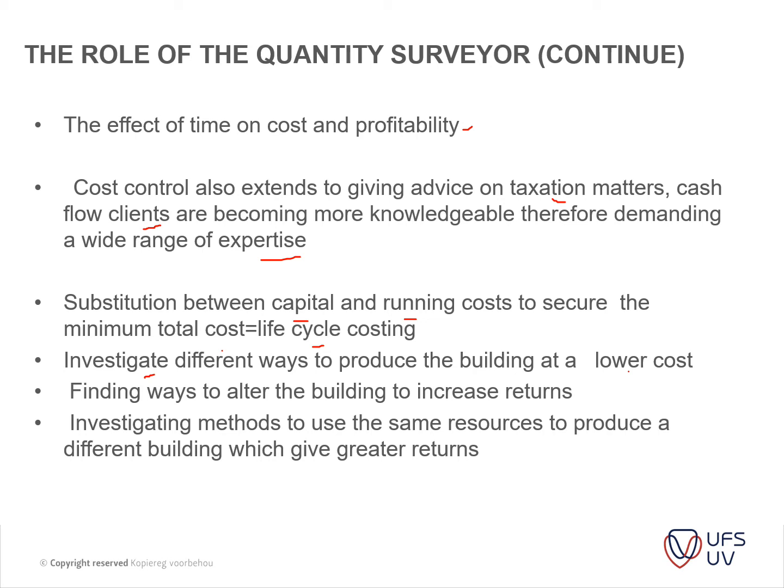For instance, porcelain tiles usually have a longer life span, but if you consider it might be a shopping mall that wants to revamp or has to uplift the presentability to the public every 10 years or so, then is it really necessary to install products that have a shelf life or a user life of 50 years, etc. So the main thing is to get to that point where you can advise the client: this is an alternative that you can use if this is the plan to replace this item after a couple of years.